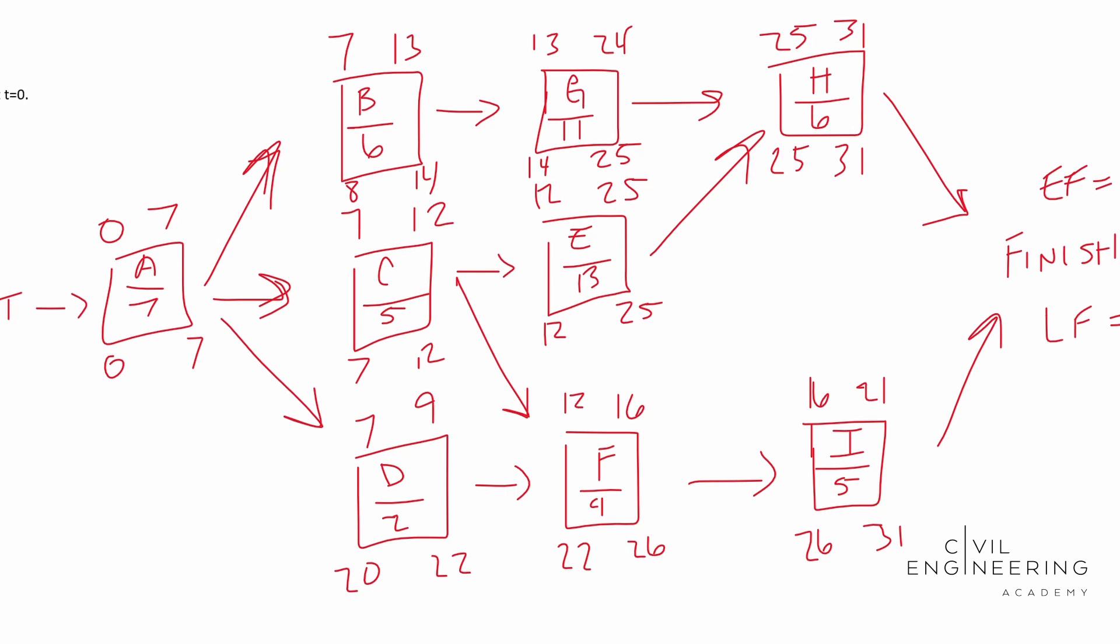So to find your critical path, it's basically where your early start, your early finish, your late start and your late finish are the same numbers. So in this case, we start at start. We have A, we have C, we have E, H, and then to the finish. That is our critical path right there.